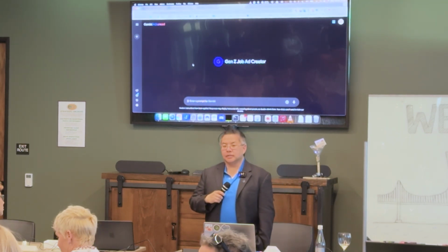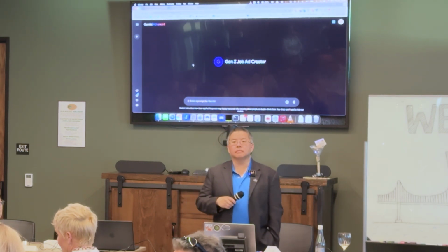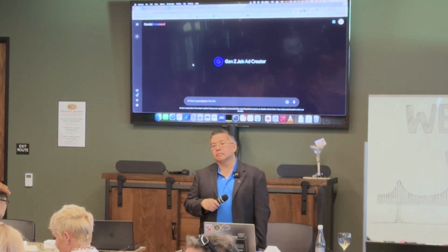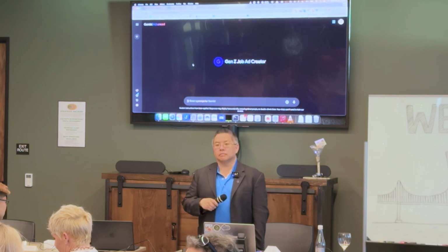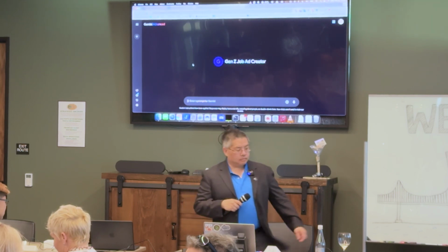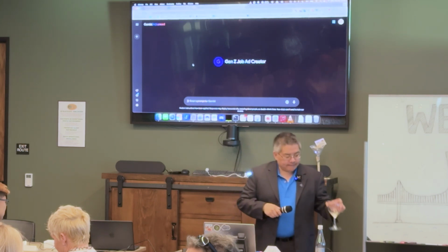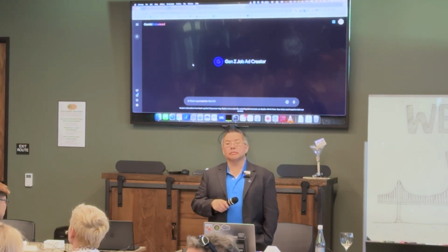There are some automated ways to do it, through an Oracle product called Textura, but a lot of times it's difficult because the client wants us to put together an invoice with a schedule of values from your budget. Every single month you have to take what your subcontractors are billing you, and then also take all of your costs.